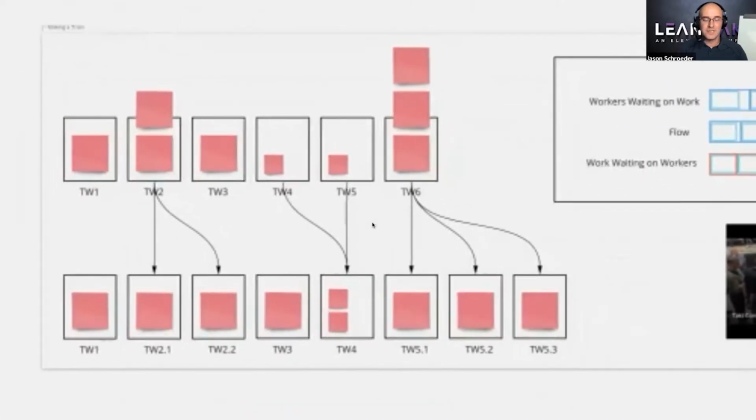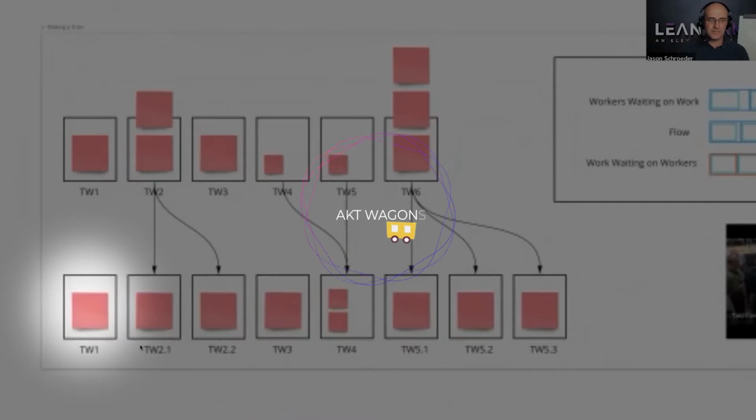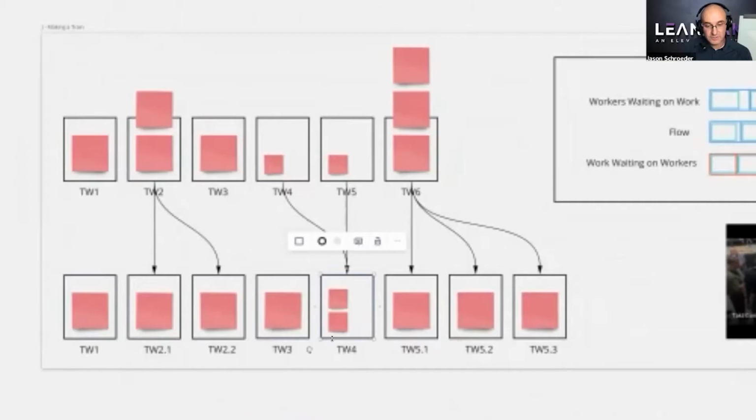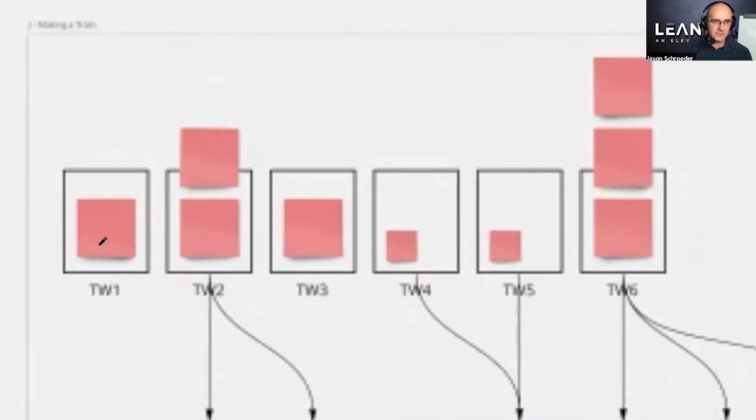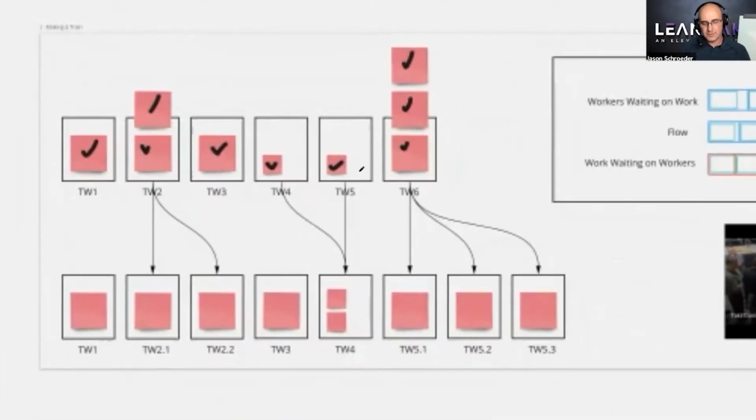In takt planning, the way that LeanTakt does it, which is not the way everybody does it, is we create takt wagons or box cars that are leveled, which is really important. So if you have a normal sequence, and up here is a normal sequence where you have a normal size activity, larger amounts, normal, small, a whole lot of work. What the problem is that when you have a sequence that's not leveled in a non-takted system, you're going to only go as fast as your slowest trade.